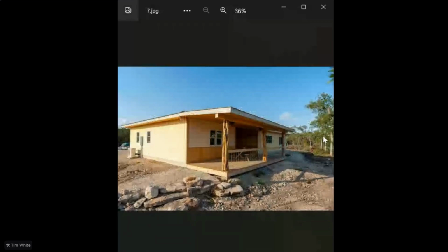And then at the end of the day, with all of that, you can end up with a building like this. We were able to use the local posts on site, which are really beautiful, but they are more work. You know, so just because in your financing package, you're like, oh, great, we're going to use the wood for a post and they're going to look beautiful and it's going to not cost us anything. Well, those are $400 posts by the time you get your labor worked into it and everything like that. They are not cheap. And it becomes a beautiful building.